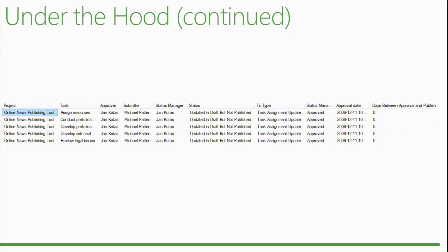After it's approved, as you have seen, someone has to open the project plan to receive the updates, then save the project plan and republish it. If it's not republished, it will never end up in the published database and never be pushed to the reporting database. I can tell you in most of the cases we have seen, this is the cause. There is nothing nefarious happening in the database or in the scheduling engine that is going to gobble your updates and throw them into some black hole of the system, and they will never reappear. They are actually always there in the database.